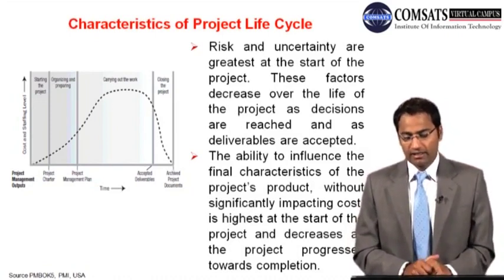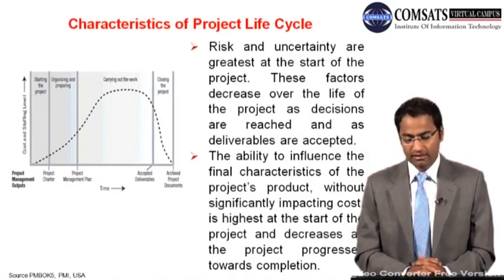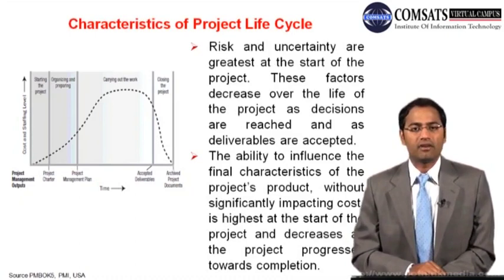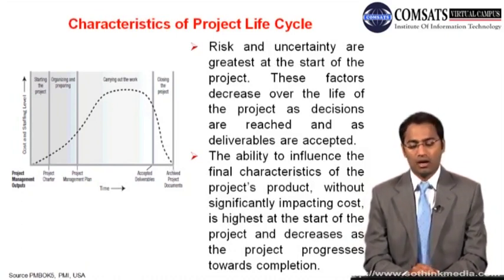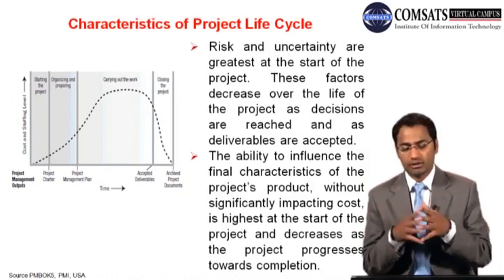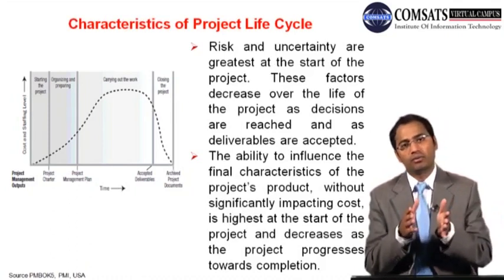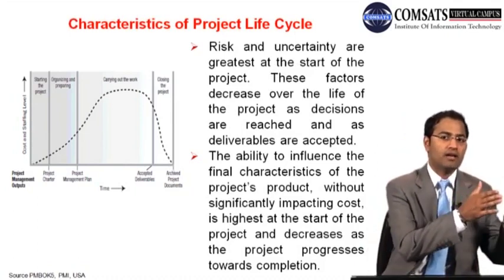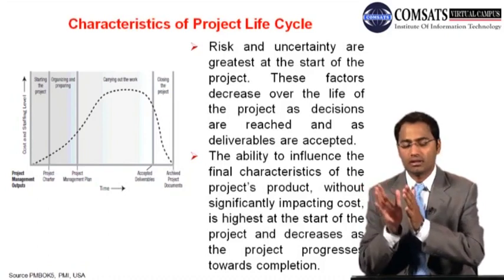The ability to influence the final characteristics of the project's product without significantly impacting cost is highest at the start of the project and decreases as the project progresses towards completion. And this is again very important. You have heard this thing, prevention is better than the cure. So if you have some problem with your process and you have identified through quality assurance processes and quality audits that one of the processes will ultimately lead towards a deliverable which may have some defects, now you can rectify your process, you can improve your process, and then you will have a deliverable which is quite acceptable to the customer or client.